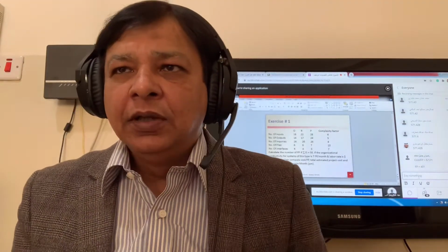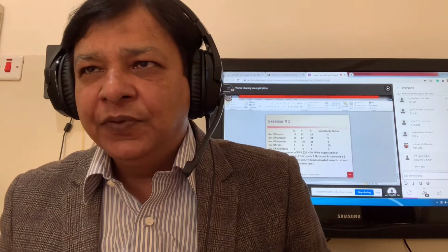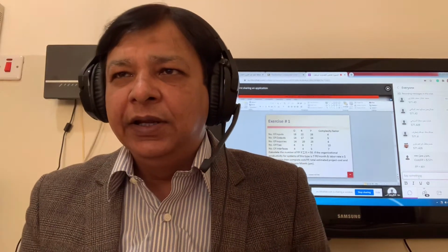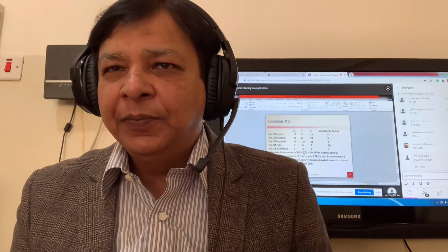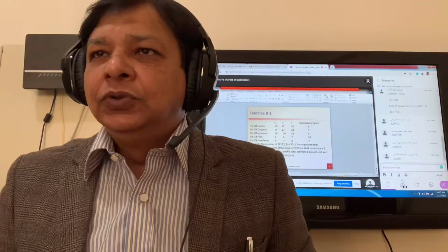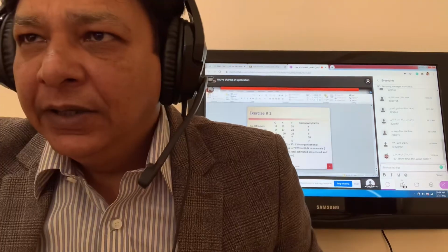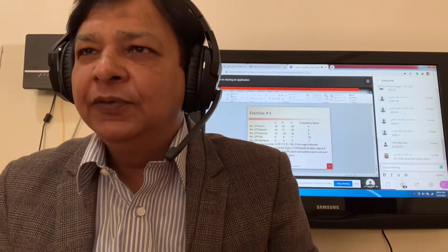We already calculated the function point of the current project, approximately 401. The cost per function point is $571 for the company, and they need to develop 401 functions. So we can calculate the cost of the project. The cost of the new project is equal to cost per function point multiplied by function point of the new project. That means 401 multiplied by 571, $228,971.